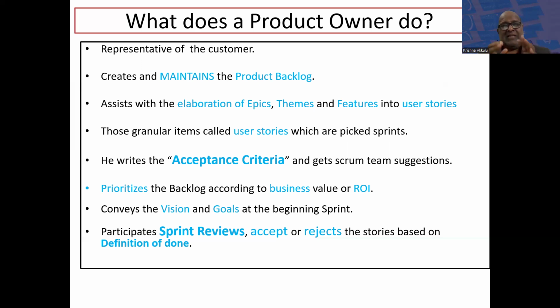And once, let us say, in the sprint, the team picks the stories, they design, develop, and test everything, and at the end of the second week, they invite the product owners, stakeholders, and customers. Then they will demo each story. They demo what we designed and developed, and how that looks.